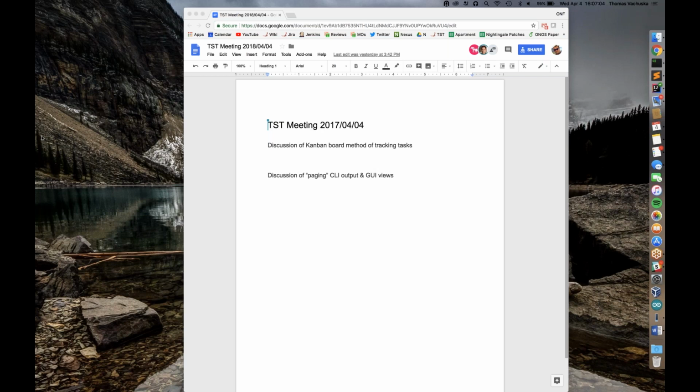But we've been seeing a severe kind of downturn in participation or activity on that front. And this is largely due to kind of a mismatch between what the sprint process aims to do and how the various teams need to operate, either because of the nature of the team, distributed nature of the team, or some other driving objectives. Like, for example, I know the P4 team was largely driven by the pacing required by getting to a specific demo, and so the sprint boundaries were rather arbitrary, shall we say. And similarly for the ODTM team, and really fundamentally also for the dynamic configuration team too.